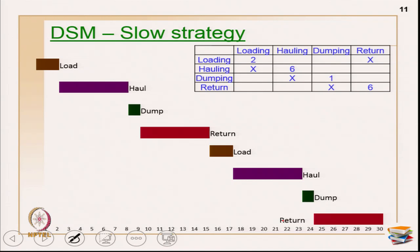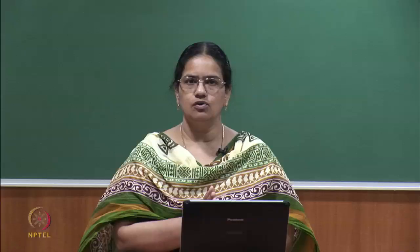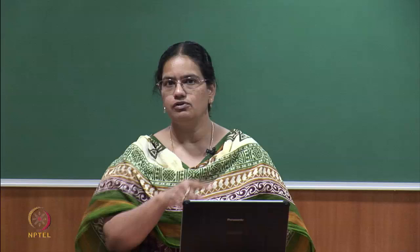The cycle flow is: after loading I do hauling, after hauling I do dumping, after dumping I do return, and once returned I go back to loading again. This is a good example of slow strategy. If I have only one dump truck as a resource, I have to complete one full cycle before starting the next - this reveals a resource pattern. So with one resource, I execute all four activities in one round, then repeat all in the second round, and so on.